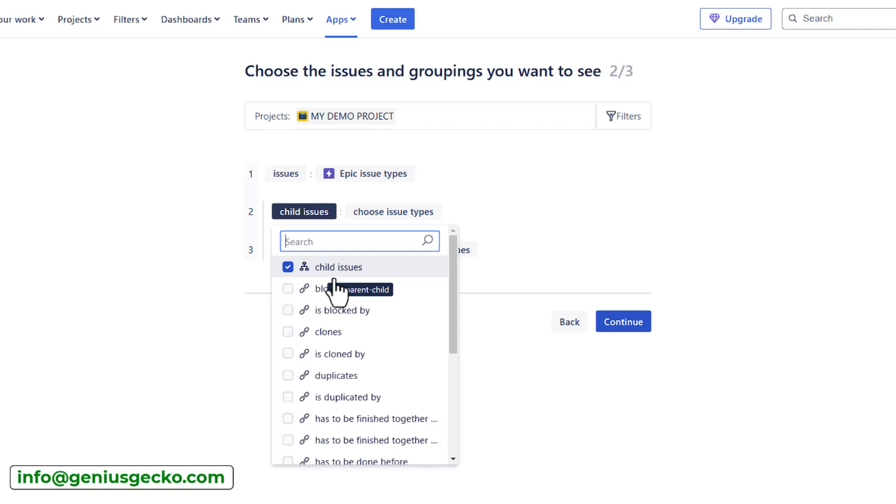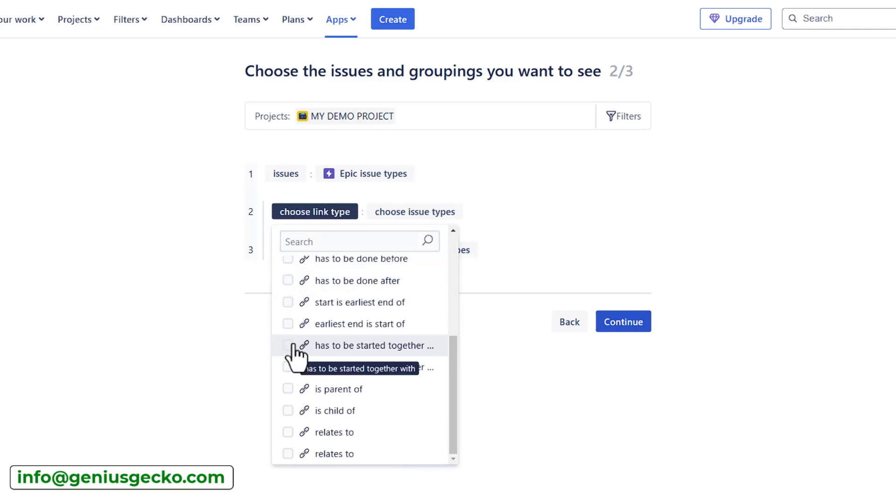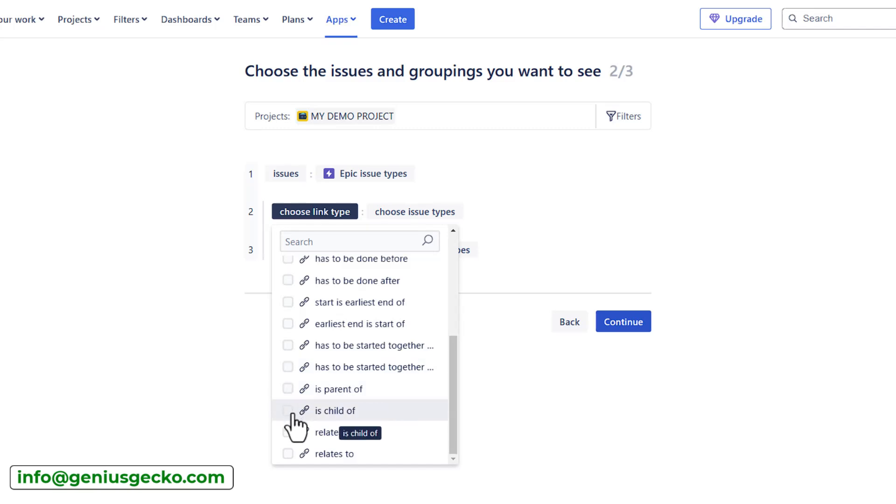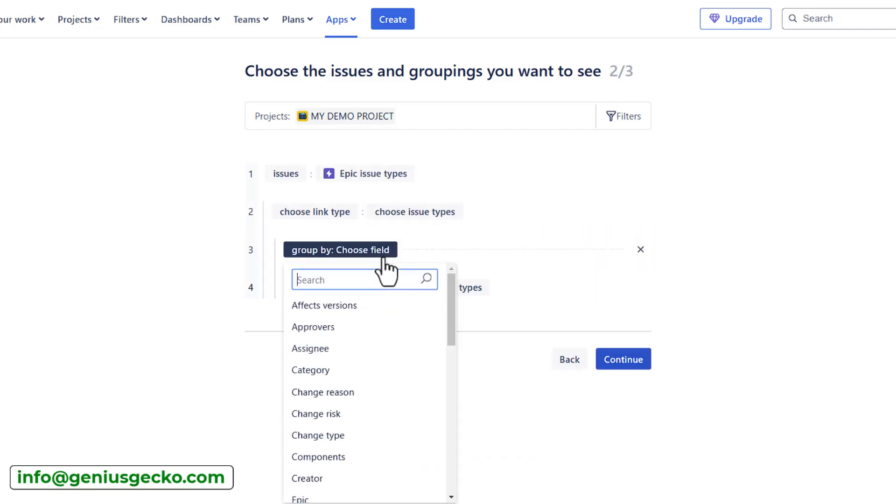Based on the child issue link, which we already used previously, I will unselect it. But for example, I have another custom link that I've created, is parent of, is child of. So I can also use this to create a separate level within the hierarchy.